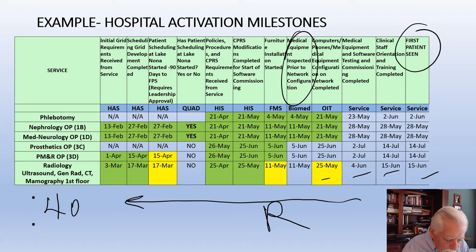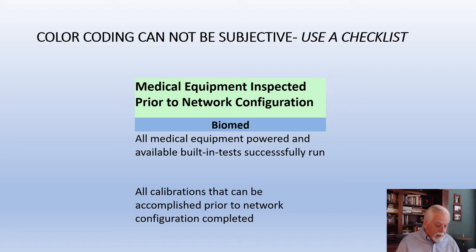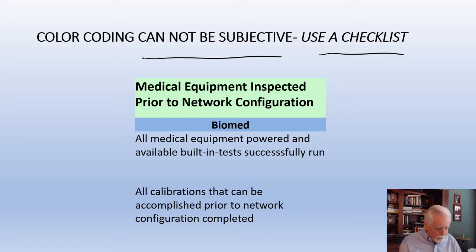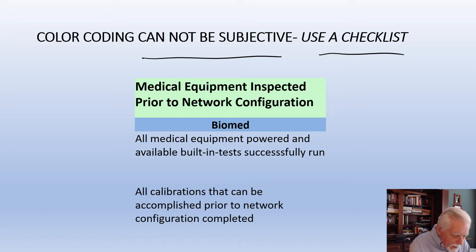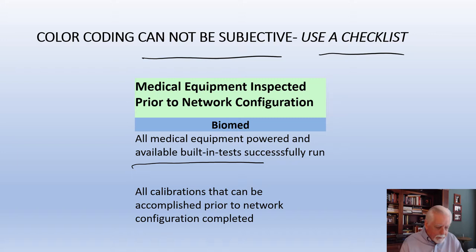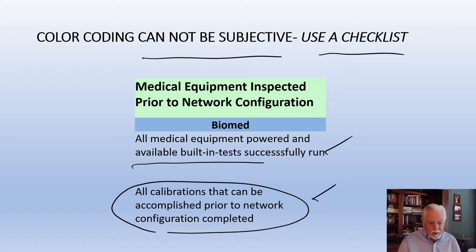If you're going to use a metric like this — whether milestones or actual data values — you must have a clear definition of what makes a field red, yellow, or green. It cannot be subjective. For example, for medical equipment inspected prior to network configuration, we used a checklist: all medical equipment must be powered and all built-in tests successfully run, and all calibrations that can be accomplished prior to network configuration must be complete. If not done by the date, it's yellow; if the date has passed, it's red.